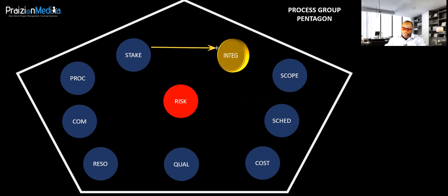Whenever you're in doubt, just open up your PMBOK guide and check to see where you have a stakeholder register or stakeholder engagement plan going into anywhere. And you know what the answer is? The stakeholder engagement plan is one of the inputs that goes into the develop project management plan process. So there is some interrelationship there.